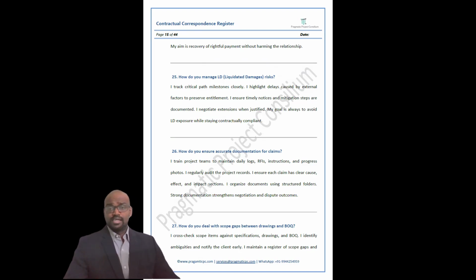And then we say that this is delaying the drawing approvals, and these drawing approvals are necessary for the suppliers or the vendors to start their package drawings. And they are long lead items, which are going to take 12 months or 15 months for delivery. And this is on the critical path. So, okay, you are getting a revision A, B, C. It's going to 7, 8 revisions. That's not fair. We are not doing it. I always used to say this. We are not building a Taj Mahal, which is going to stand for 600 years. We are building a power plant. In 25 years, it will have a new technology improvement.